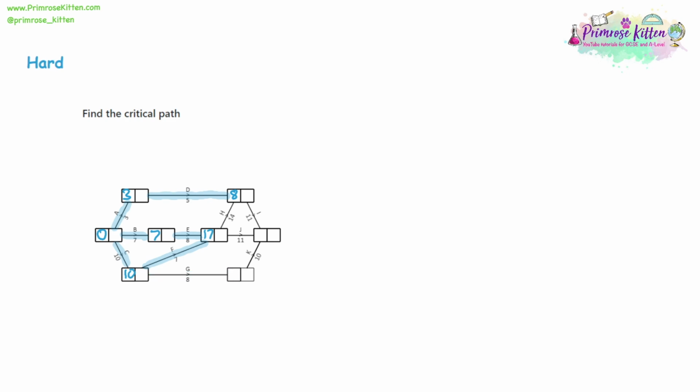Let's look at H next. That's 14, so that's going to be way bigger than the 8, isn't it? So 17 plus 14 is 31. And so we had 11 to 31, we're going to get 42. That's probably going to be the largest, but let's look at the others. So 18 plus 10 is 28, that's smaller. And 17 plus 11 is also 28, that's smaller too.